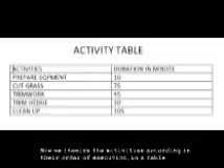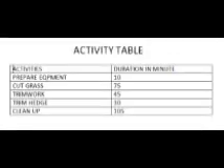Should cutting of the grass start before preparing of the equipment? Of course not. So that means you have to now place preparing of equipment first, because obviously it's the first activity that needs to be accomplished before anything else can be accomplished as well.